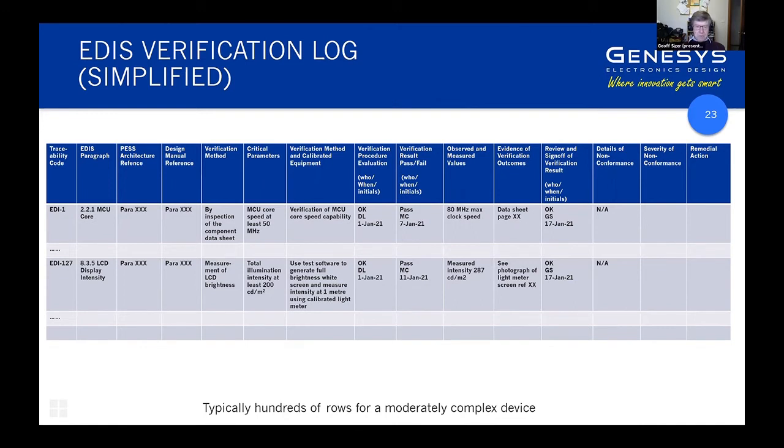So having gone through the process of signing off that the verification process is appropriate, make absolutely sure that you have in your records a signed off document with signatures on it that predates the undertaking of the tests. You can't verify the procedure after you've done the tests. You must do it beforehand.